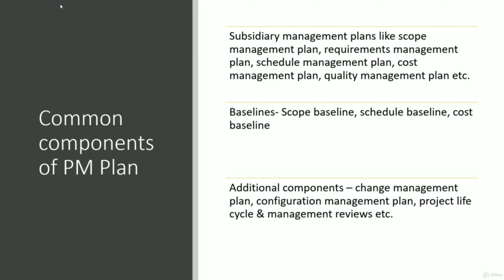Baselining is basically the signed and approved version. So let's say you started with a 100,000 USD budget, but then you went to the stakeholders and they said they cannot give you more than 75K. You worked with the development team and came up with the estimates within that. So 75K will be your approved and signed off limit, and this is the baseline.